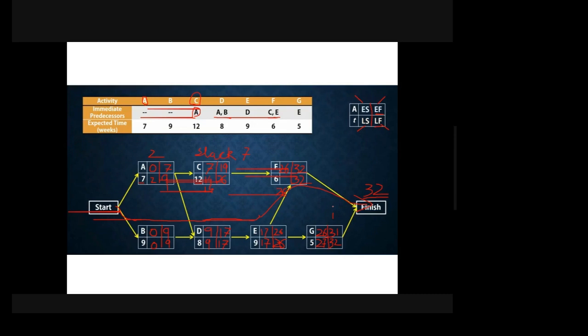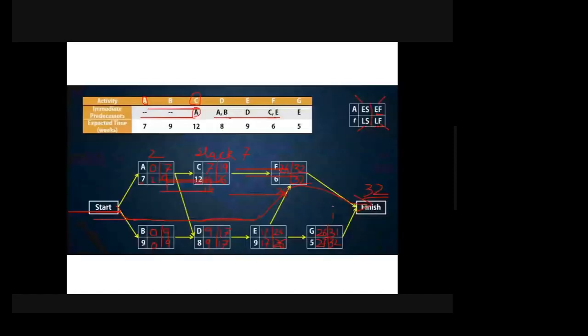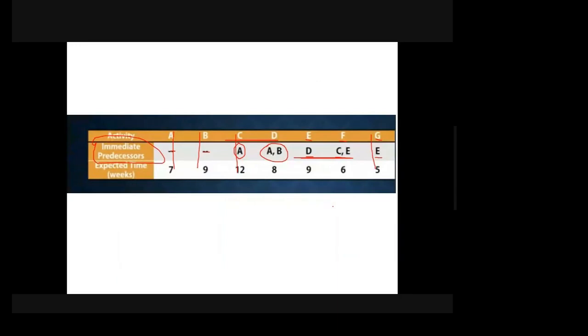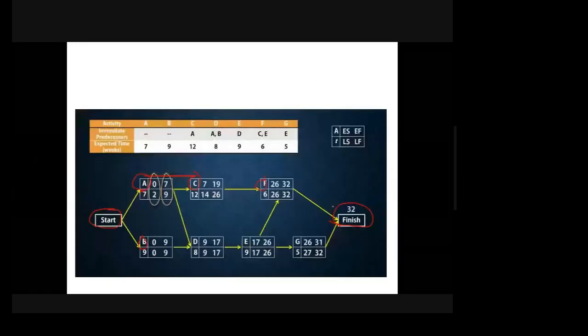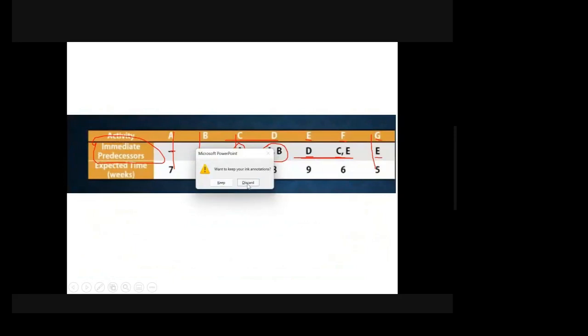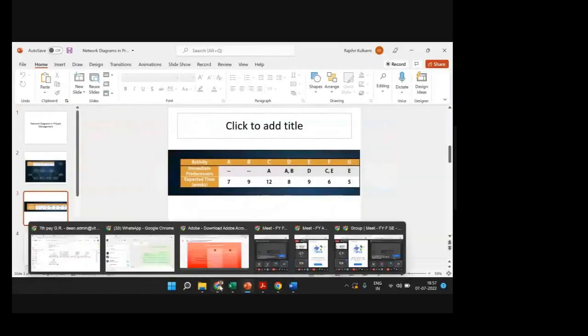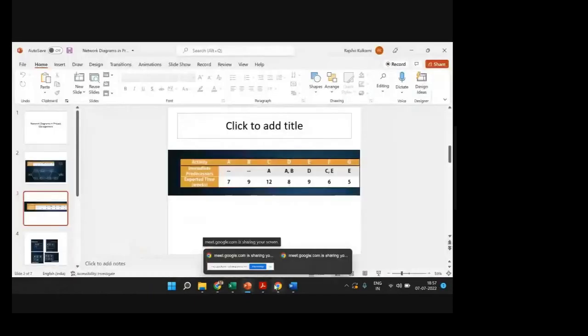The critical path is the shortest possible timeline for finishing the project on time — you cannot finish faster than this, and any delays on these activities will delay the entire project. You can annotate on the shared slide and submit the project, writing a comment stating what the earliest start, latest start, earliest finish, and latest finish times are. This is a very important aspect of project management and will help everyone working in the field.